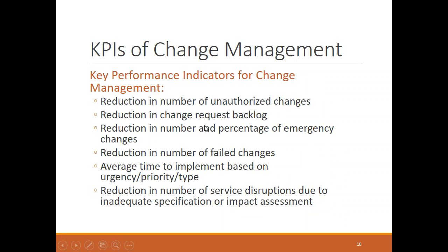In an IT development area, you're going to have change requests come in. We can't fix them immediately, so they go into a queue, a backlog. If that backlog is growing, that means our change management might not be working so well. Emergency changes mean that things are kind of out of control.